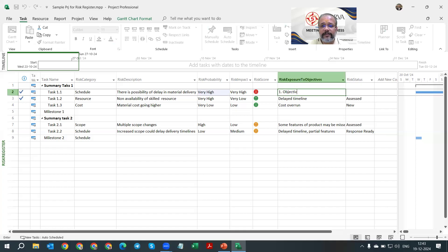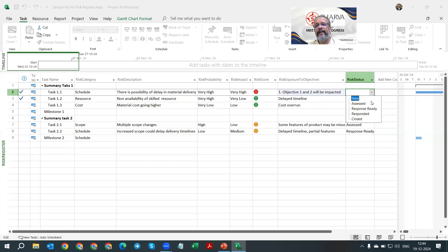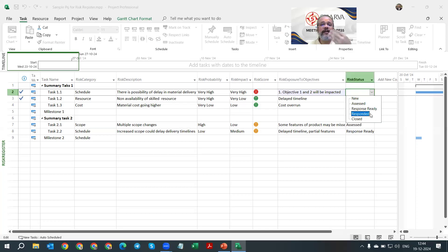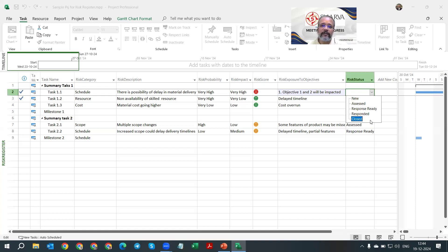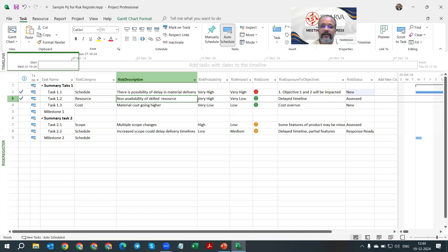You can add which objectives are impacted — for example, objective one and two — this is a free text field. Then set the risk status: is it newly identified, assessed, do I have the response ready or contingent plan prepared, or has it already been responded to? If the velocity was fast and proximity was near, we've taken action and can mark it as responded. You can also mark risks as closed during the project lifecycle. Some data is pre-populated as well.